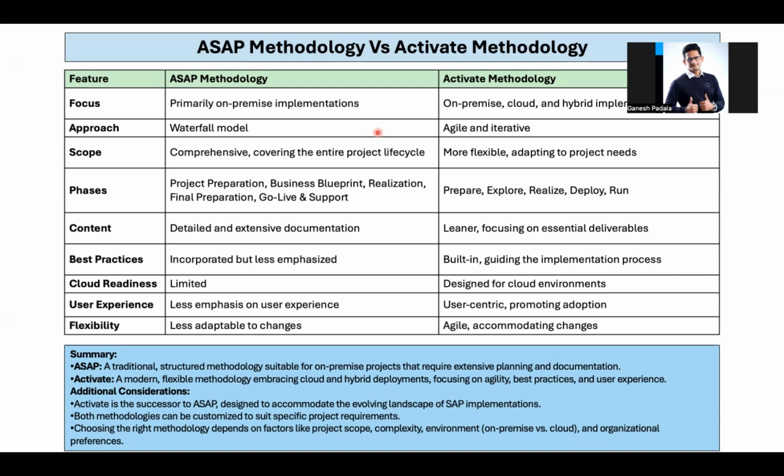Okay, and in public cloud, it could be possible because there are many things with no configuration changes, no programs, no customization, right? So in public cloud, I believe we see more of this agile and sprint related work. But when it comes to private cloud and on-premise, if I move my complete MM configuration or some basic configuration to SAP, what can we do? We need SD, we need finance, and all those things we have to move together. All those things we could put into certain sprints.